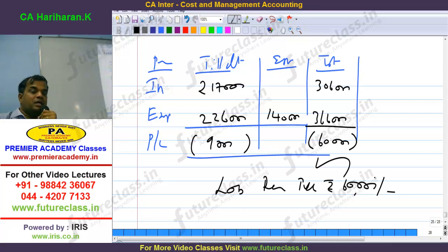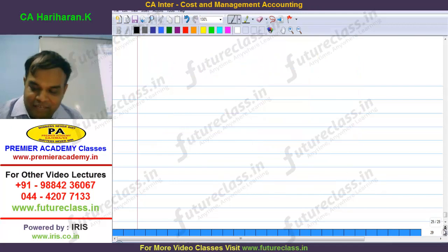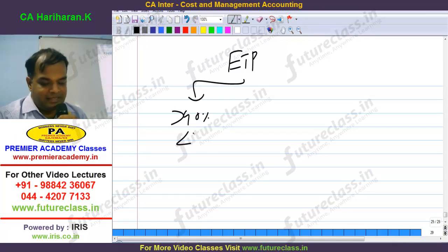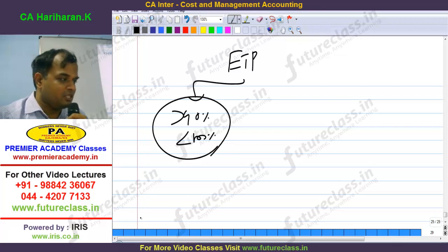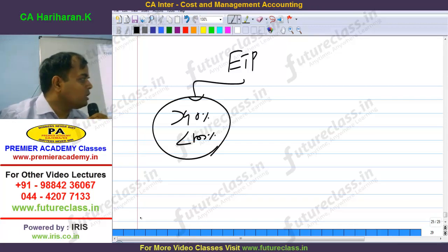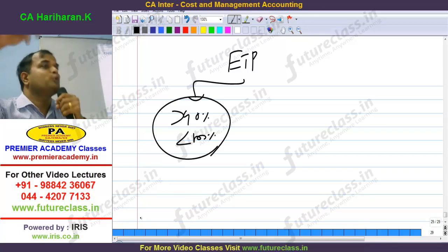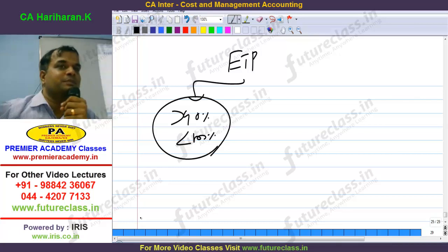Now, we have applied which method? Prudent method. We applied which method? ETP method. Now, in which circumstance is the ETP method applicable? Above 90 but less than 100%, the substantial completion stage. But what is the degree of completion given in this question? That is what Abhishek's doubt was. Now you understand. Very good Abhishek.